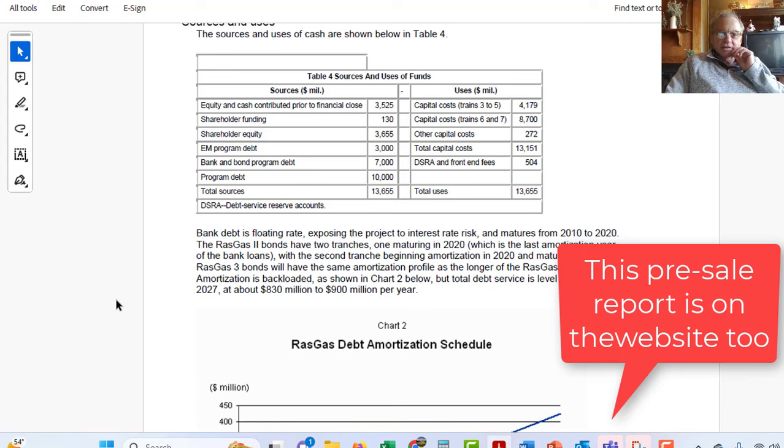Okay. And then what you can do is take this and just multiply it out. So this number here, straight from the case, we can put the hours in, 8760 hours, take the capacity price, multiply it by the hours, and then you can get the price per megawatt hour, and you can get the total revenues. Now to that, I added the fuel management fee, and that's how, not counting the margins you're making on the EPC contract and other things, that's how much you're making just for being an investor plus the fuel management fee. That's our revenues.